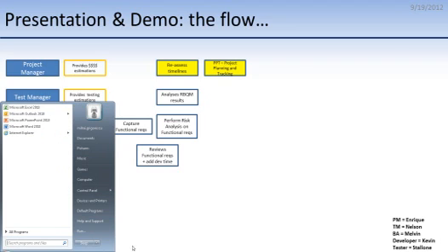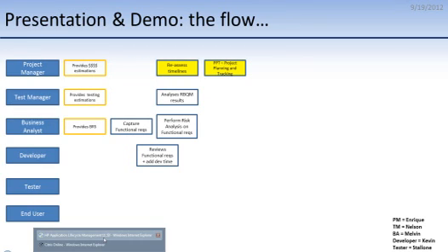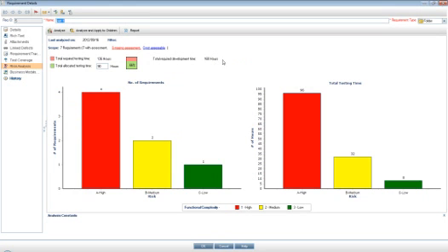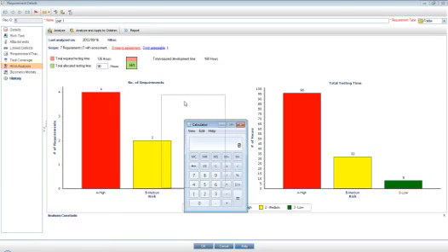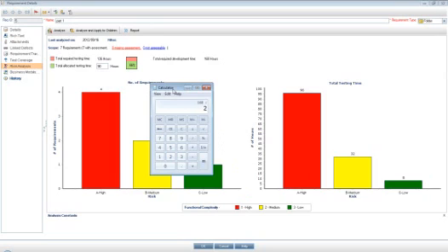Okay, I have to accelerate my rhythm because we're not going to have enough time to go through everything else. But in principle, this is what the project manager with the test manager will be looking at. Total required development time is 168 hours. If you take these number of hours as duration, divide them by the number of resources you have, so for instance, you have 2 developers in your team, then let's look at the calculator: take 168 hours divided by 2 resources, divided by 40, which is hours per week. You need, in essence, 2.1 weeks in order to develop these particular requirements, and that is a very good estimation as far as estimations go.